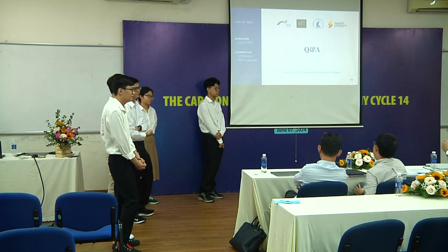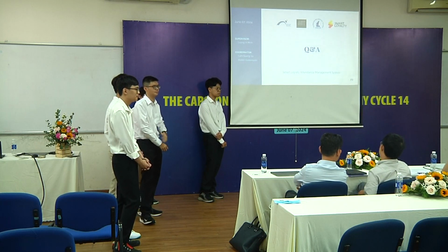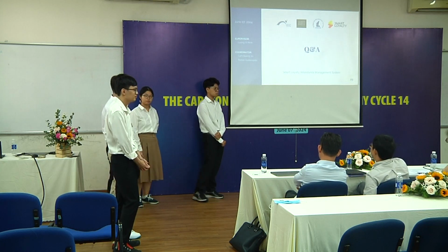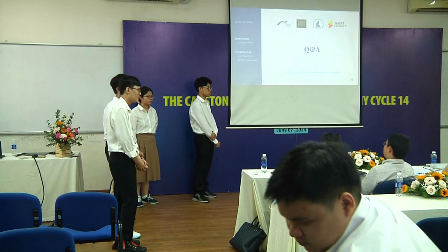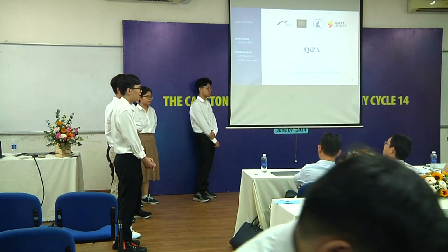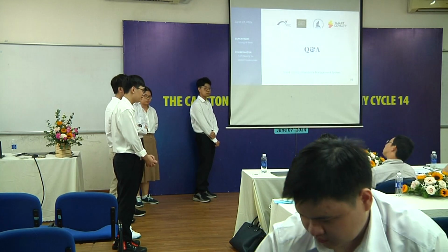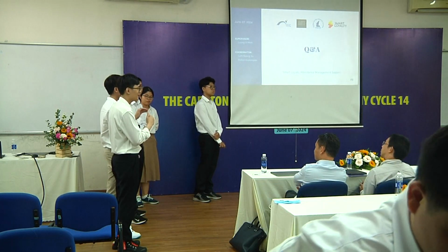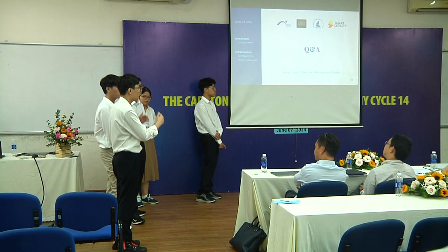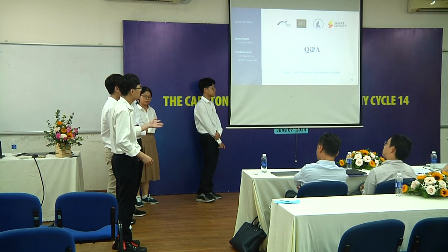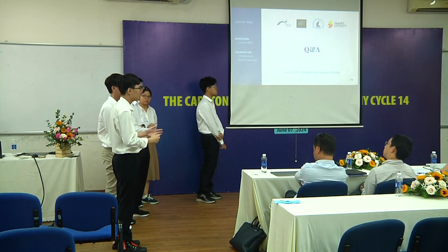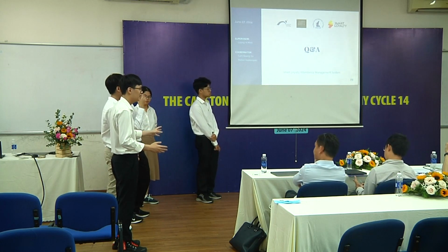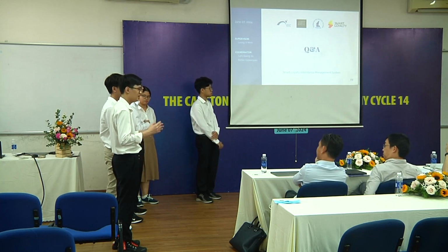So did you analyze any kind of risk when they deploy the tenant check-in system? Yes, we do. And actually, we listed them on the very first day of the project, which is the proposal. There were several risks that we discussed with our clients, that our product cannot handle, and they said that it's okay.